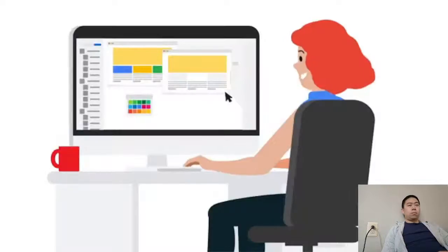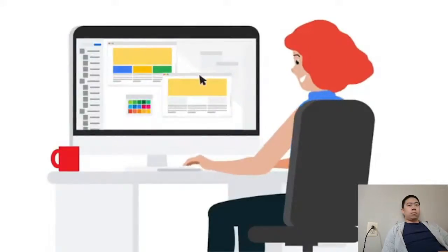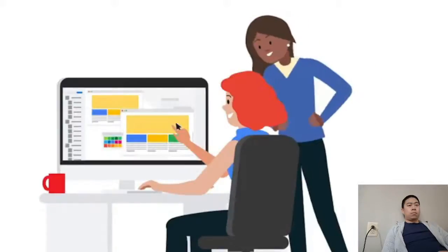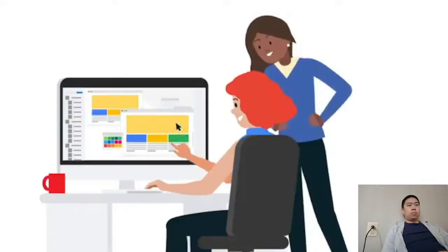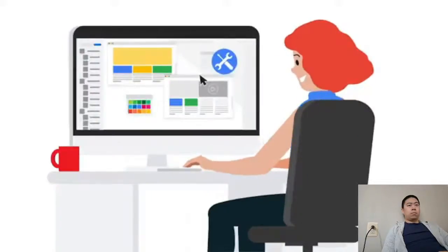For example, in order to reach the design milestone, your website designer will need to create initial mock-ups of the proposed website design. You'll need to review those mock-ups, and the designer will need to implement your feedback. Each of these items is a project task, and you won't reach your milestone until they're complete.